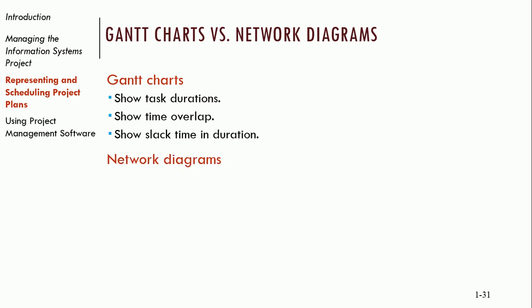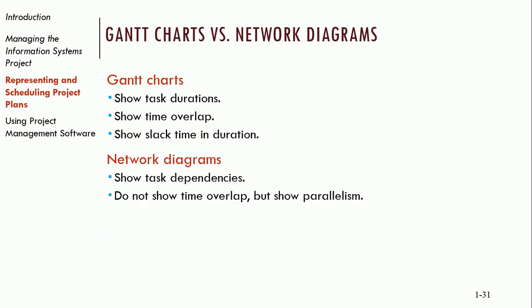A network diagram is a little bit different. It shows task dependencies as opposed to the timing of those tasks, but it does not show time overlap. In fact, a network diagram doesn't really show time at all. We don't care about how long it takes to complete a task in the network diagram.